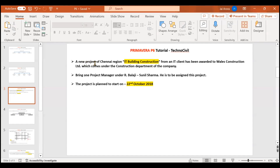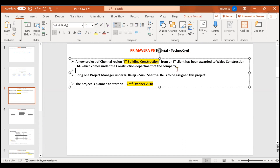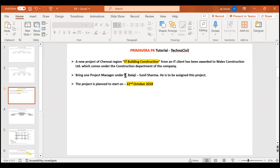The presentation says that a new project of Chennai region - IT building construction from an IT client - has been awarded to Wales Construction Limited, which comes under the Construction department. You have to bring one project manager under R. Balaji, who is Sunil Sharma, and assign him the IT Building Construction project. The project is planned to start on 22nd October 2018. We will execute these things in Primavera P6.